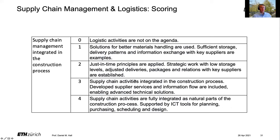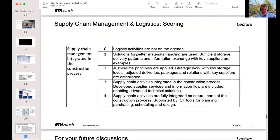This is how we might think about supply chain management and logistics — the scoring of activities using ratings of zero to four. If it's zero, you don't really think about logistics — you just send things out and hope they get delivered on time. One is using better solutions for storage and information exchange with key suppliers. Two is moving towards just-in-time or lean principles with low inventory and relations with key suppliers. Three is really integrating supply chain activities into the construction process, with technical solutions for information flow. Four would be a fully integrated process using technologies like RFID and advanced sensors, creating a very advanced feedback loop from your supply chain to the construction site.